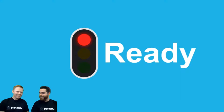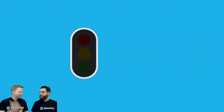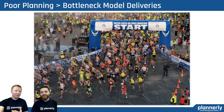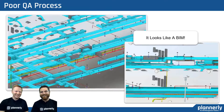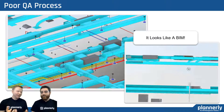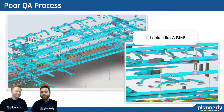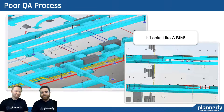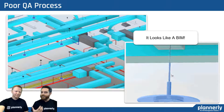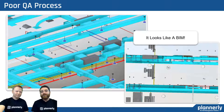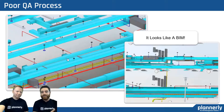What standards are you going to follow? What's the purpose — why are you doing BIM in the first place? Flexibility is what we've heard. But unfortunately, without planning and without that sequence of events, and without understanding of when deliverables are going to occur, we have bottlenecks and we get a lot of deliverables that maybe we need to review all at the same time. We might end up falling flat on our face like those motorcycle guys. And we get models, but if we have a poor QA process, this looks like a BIM — it looks like a good model. We might have had a good plan, but if we don't have that QA process aligned internally, or the right tools to support it, we could be wasting a lot of time going through element by element, making sure they meet the initial requirements we agreed on.